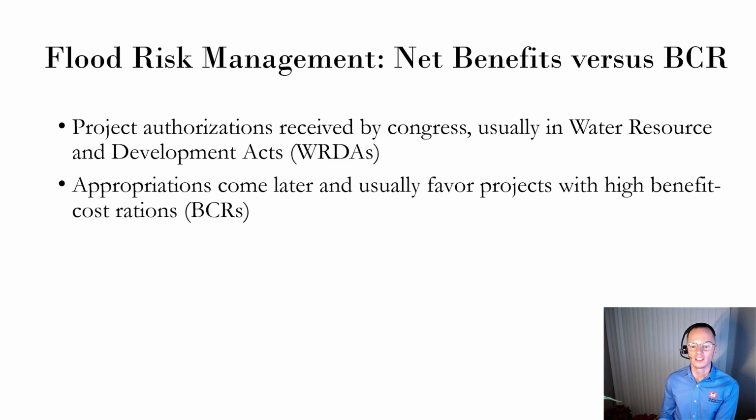With program A, you will pay $200 and receive $400, a 2-to-1 return, which is another way of saying the BCR of the investment is 2. Your net benefit is $400 minus $200, which gives you $200. With program B, you will pay $200 and receive $2,000, a 10-to-1 return because the BCR is 10. Your net benefit is $1,800.